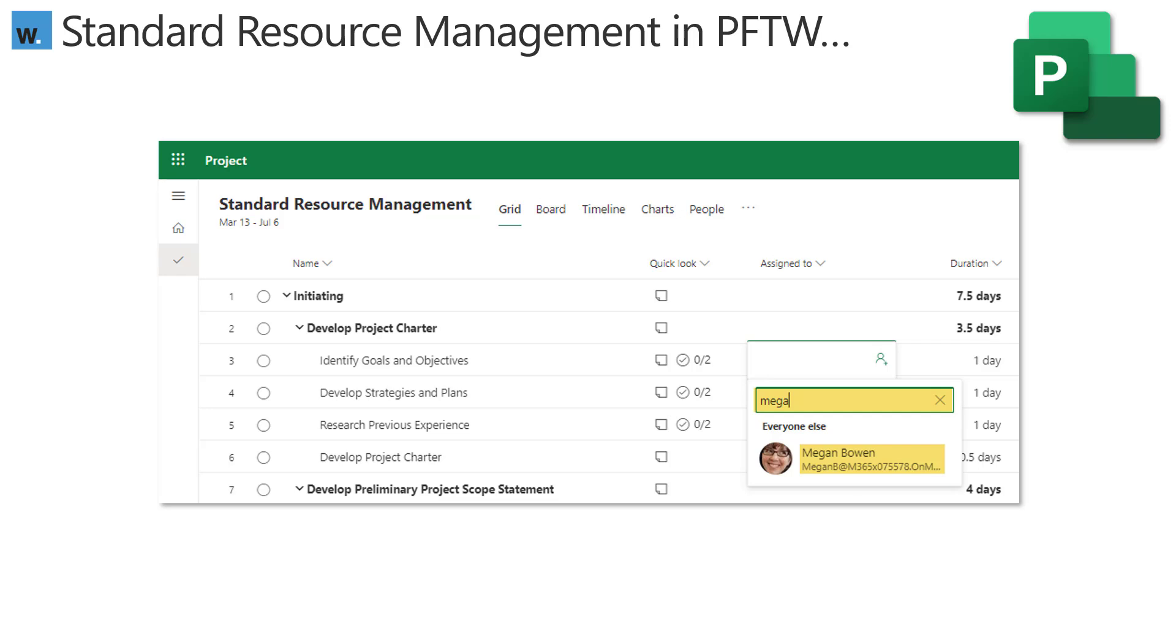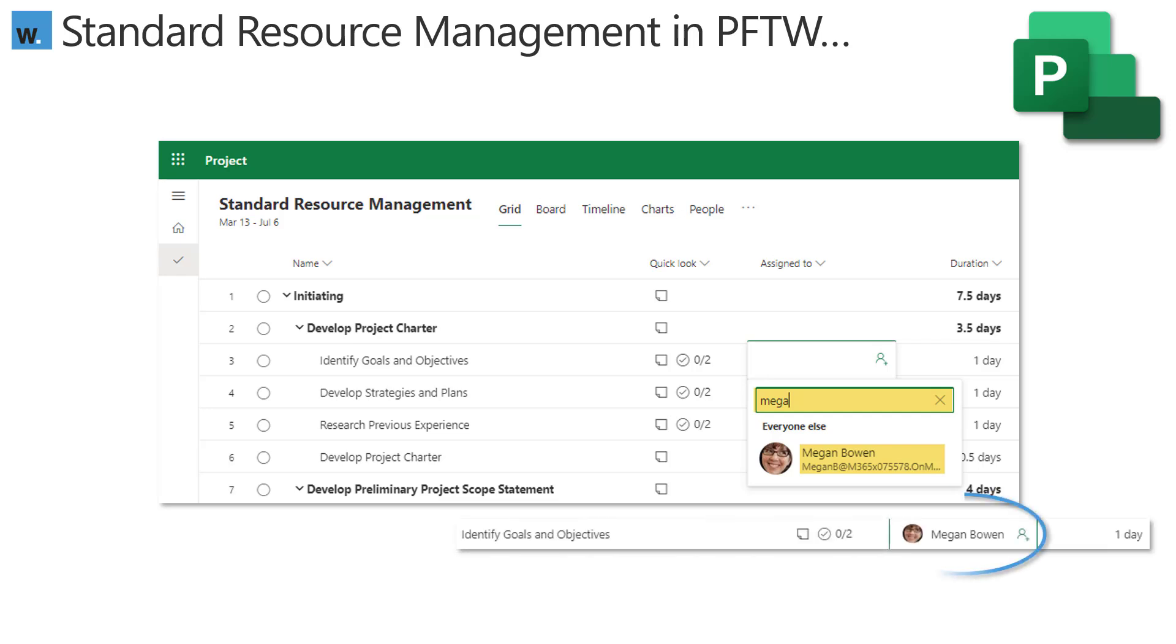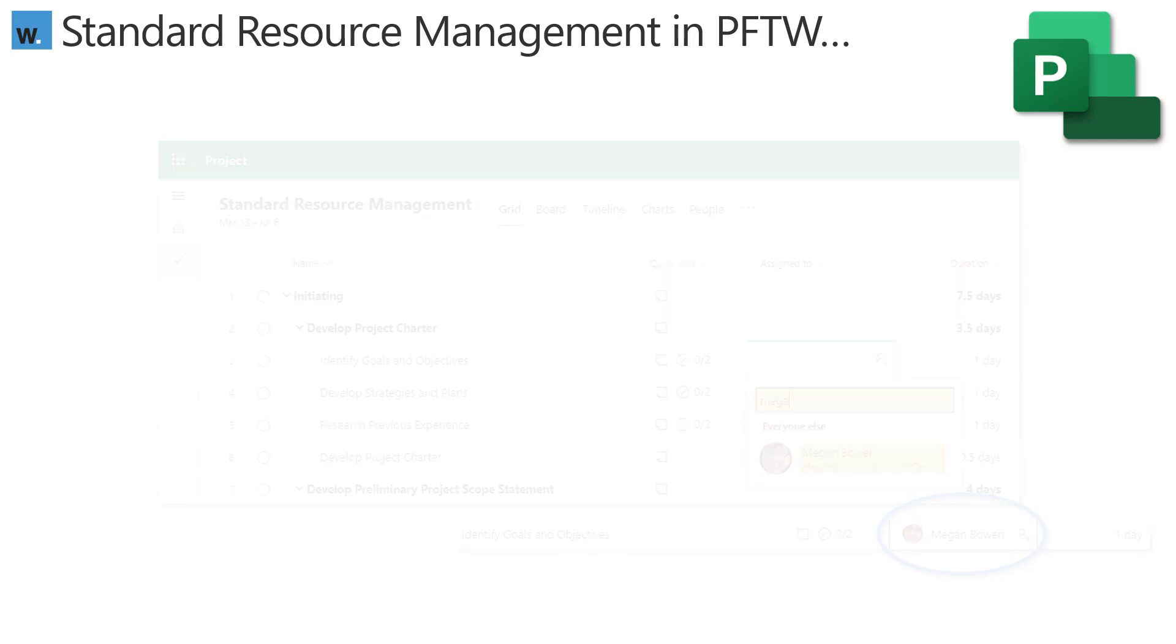Let's start by focusing on the standard resource assignment process within Project for the Web, which is really very straightforward. You simply start by creating a plan with tasks. And in the assigned to column, you simply start typing in the name of the person you want to assign. Through the backend AD link, that person is found and simply assigned against the task. Once that's done, they'll get a notification to inform them that they've been assigned some work. And if you've already got a Microsoft 365 group in place linked to the project, you can also select group members and assign them against the tasks as well. And that's basically it. It's a very simple process, which for smaller teams, I would say would work incredibly well.